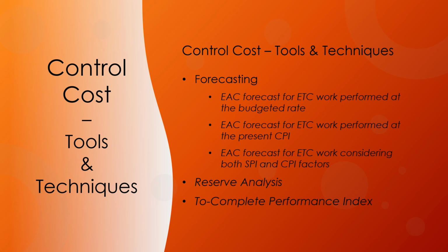If the cumulative CPI falls below the baseline as shown in the figure, all future work on the project will need to be performed immediately in the range of the TCPI BAC, as reflected in the top line of the figure, to stay within the authorized BAC. Whether this level of performance is achievable is a judgment call based on a number of considerations including risk, time remaining in the project, and technical performance. This level of performance is displayed as a TCPI EAC line.